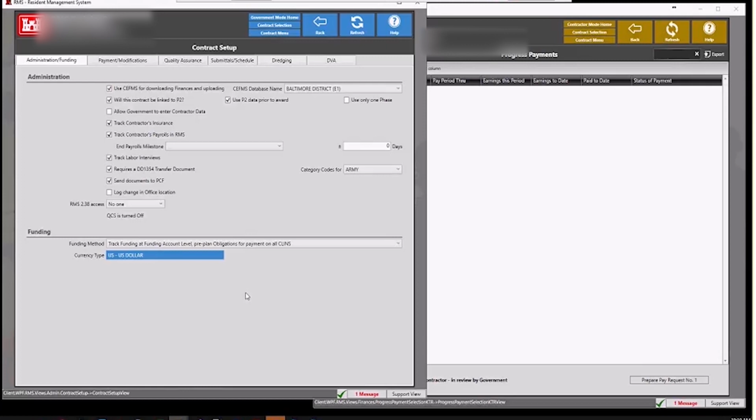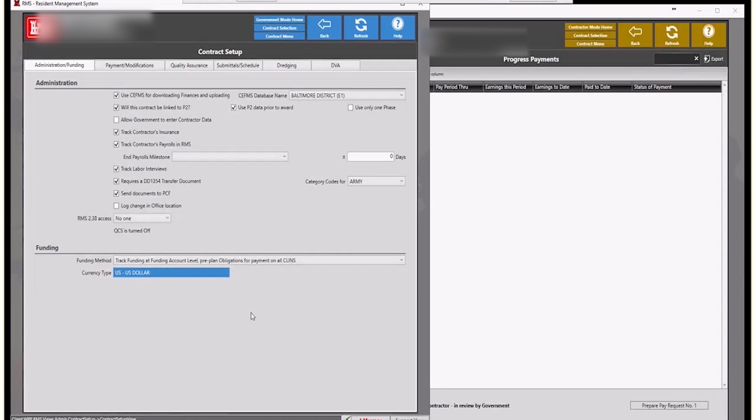Okay, good question. So the contractor can't do anything with the CLINs. All they can do is assign activities to the CLINs. So what CLINs are assigned to what obligations and what is billed against the obligation, that is all in the realm of the government. So it has nothing to do with the contractor, really. It just is pointing to where the money is coming from, not how much money is given on what activities. So the CLINs cannot be changed. Only the activity amounts that are assigned to the CLINs can be changed by the contractor.